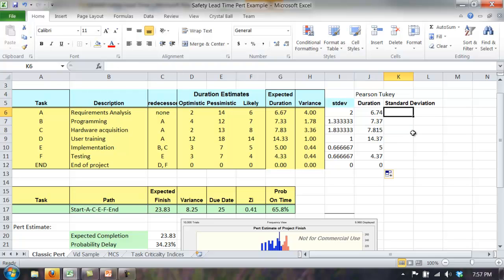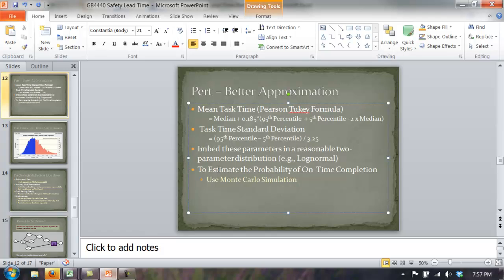The formula for the standard deviation: what's in the numerator are the same numbers — pessimistic minus optimistic — but now we're no longer assuming that's the whole range of the data. We assume that represents about 90% of the data, so the range containing 90% of the data is divided by 3.25. Previously, for variance we divided by 36, whose square root is 6. So we have a smaller denominator than the classic PERT — 3.25 instead of 6 — and consequently our standard deviations will be slightly larger.